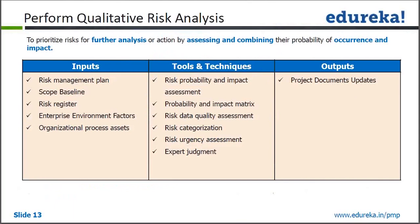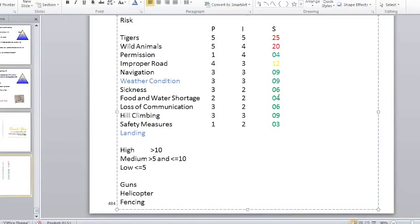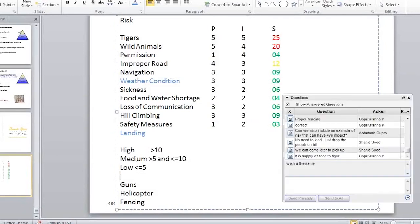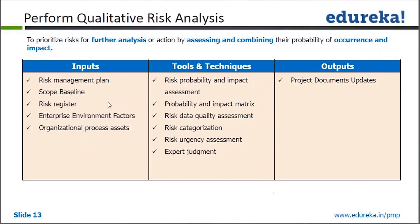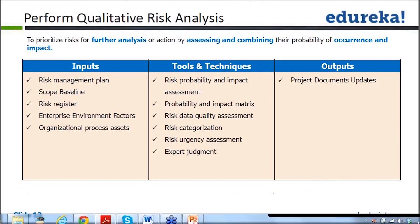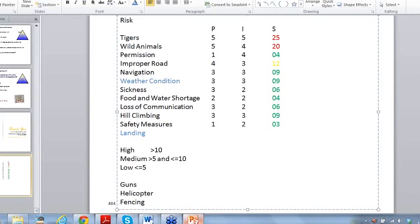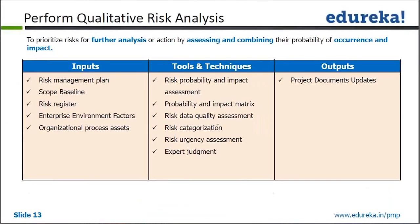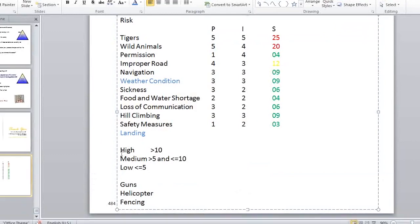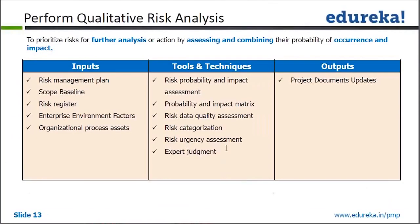The next step after identification is qualitative analysis. What we did — putting values and creating a risk score — is called qualitative analysis. Inputs are risk management plan, scope baseline, risk register, EEF, and OPA. Tools and techniques include risk probability and impact assessment, probability and impact matrix, data quality assessment, risk categorization (high/medium/low), risk urgency assessment, and expert judgment. The output is a project document update. In most projects, qualitative risk analysis is sufficient — we do not always need quantitative risk analysis.